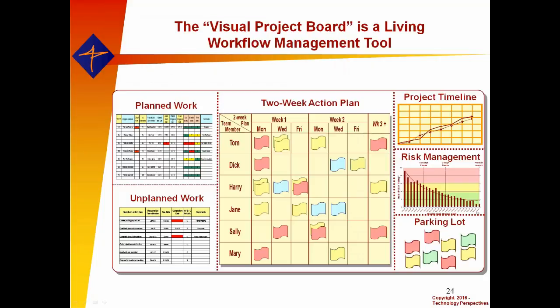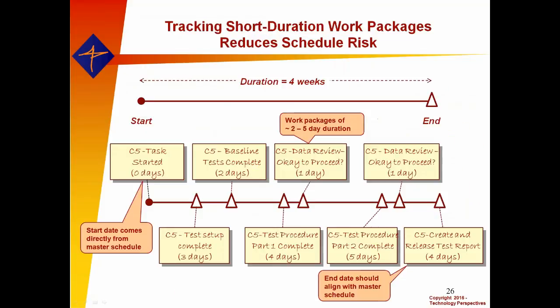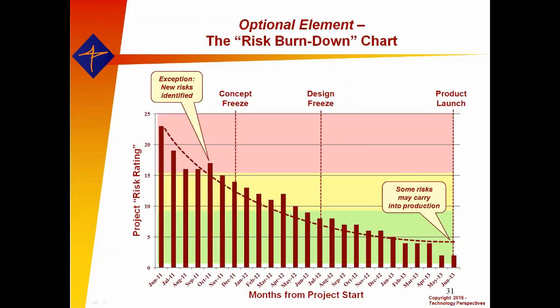Okay. So I think I may have answered that already a little bit further on when I showed this slide. And again, I call it a risk burn down tool. The goal here is that each month the team refreshes what I call a risk register, which is a prioritized list of project risks. And as mitigation and learning and accomplishment feed into that risk register, we should see that metric or indicator dropping.